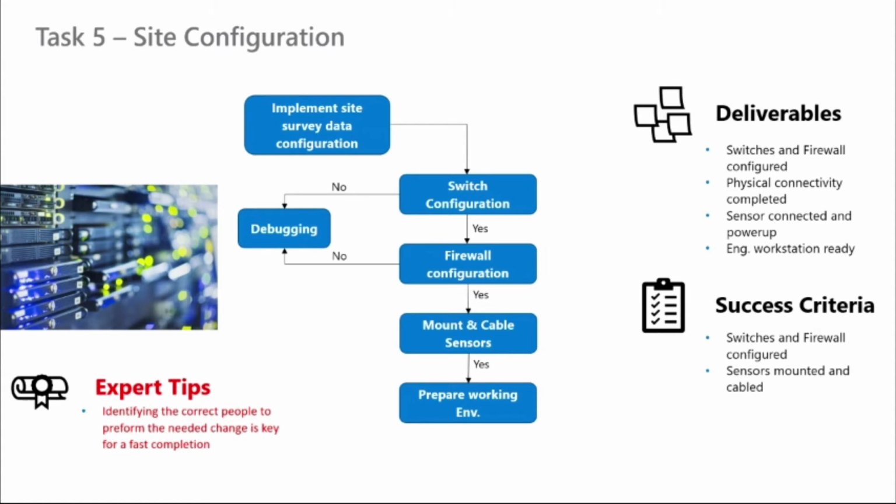Now, I said a minute ago that all of this is fine as long as we have the right people. And this is where I turn your attention again to the fact that configuring the switches, configuring the firewall, and doing the physical installation pathway are done differently in different companies. The earlier we identify these stakeholders in the kickoff meeting and assign this task to them, the easier it is for us in this stage of the deployment lifecycle to tell them, these switches in this position need to span port from these different ports in the switch all the way to this physical instance.